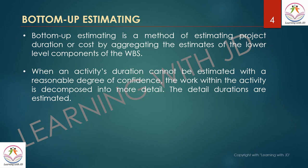Bottom-up estimating is a method of estimating project duration or cost by aggregating the estimates of lower-level components of the WBS. When an activity's duration cannot be estimated with a reasonable degree of confidence, the work within the activity is decomposed into more detail. These decomposed activities are further estimated, and you roll them up to create your bottom-up estimation.